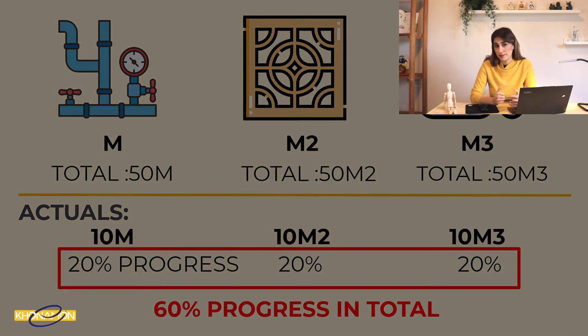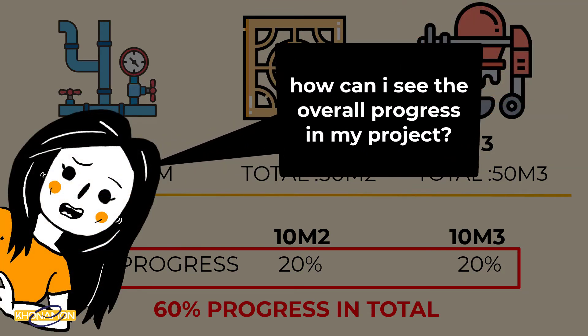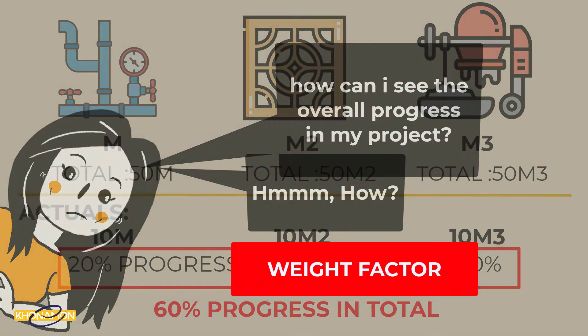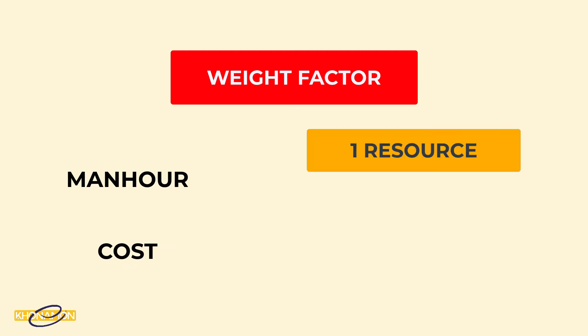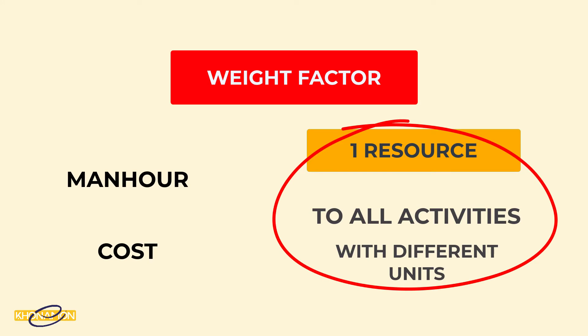Absolutely not. How can I see the overall progress in my project? Here, the weight factor shows itself to help us. Weight factor relies on two items: man hours and cost. Here, we assign just one resource to all these activities with different units. Instead of assigning a bunch of resources to one activity, we just assign one resource. It is called virtual resource.